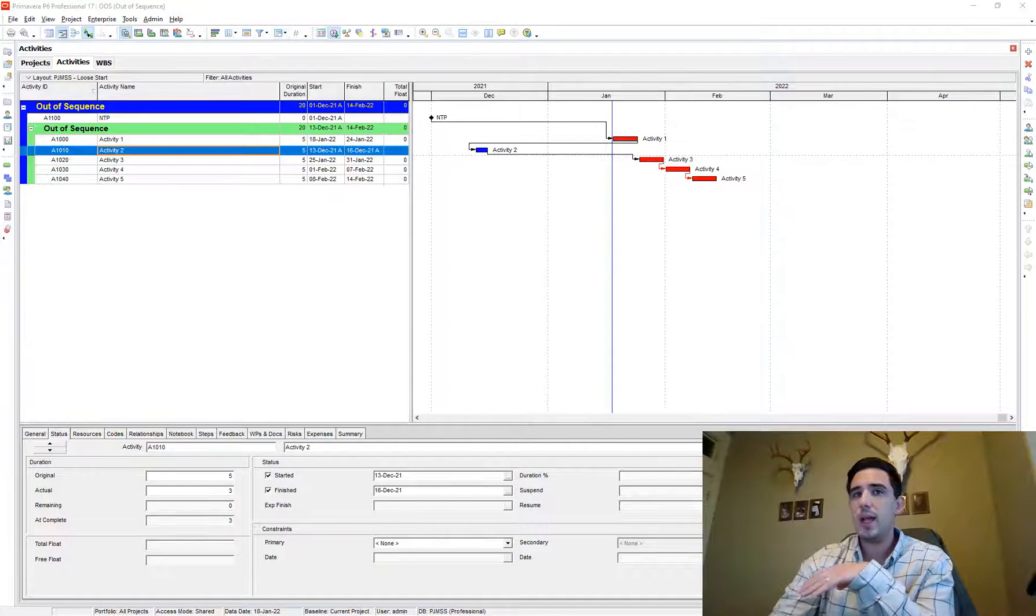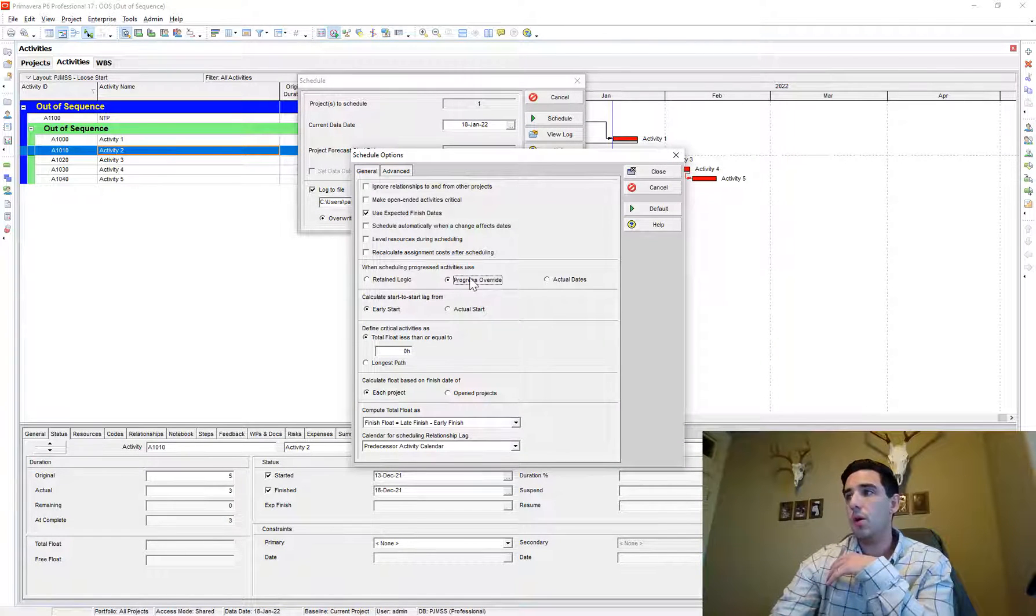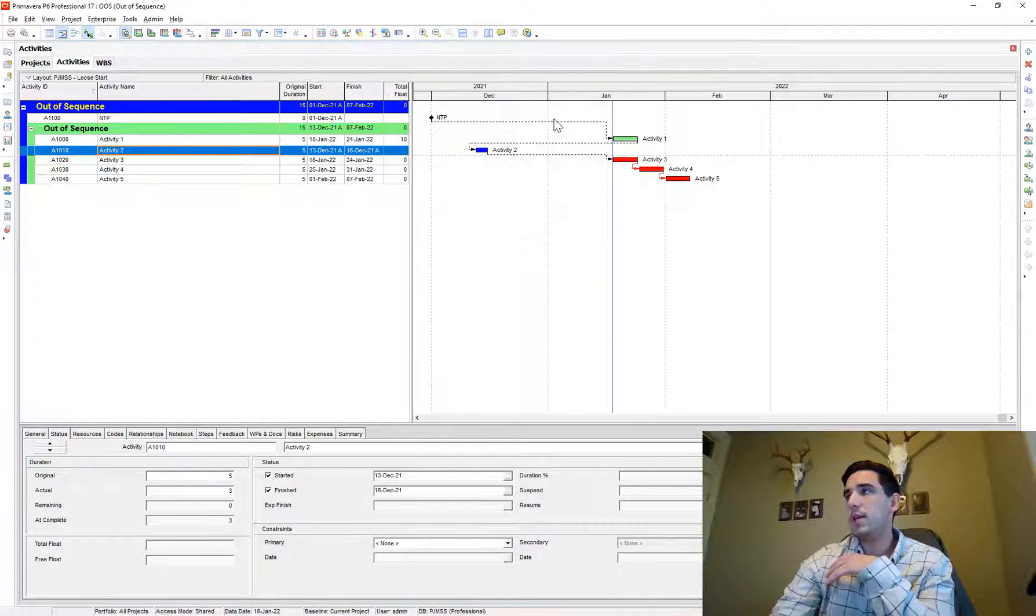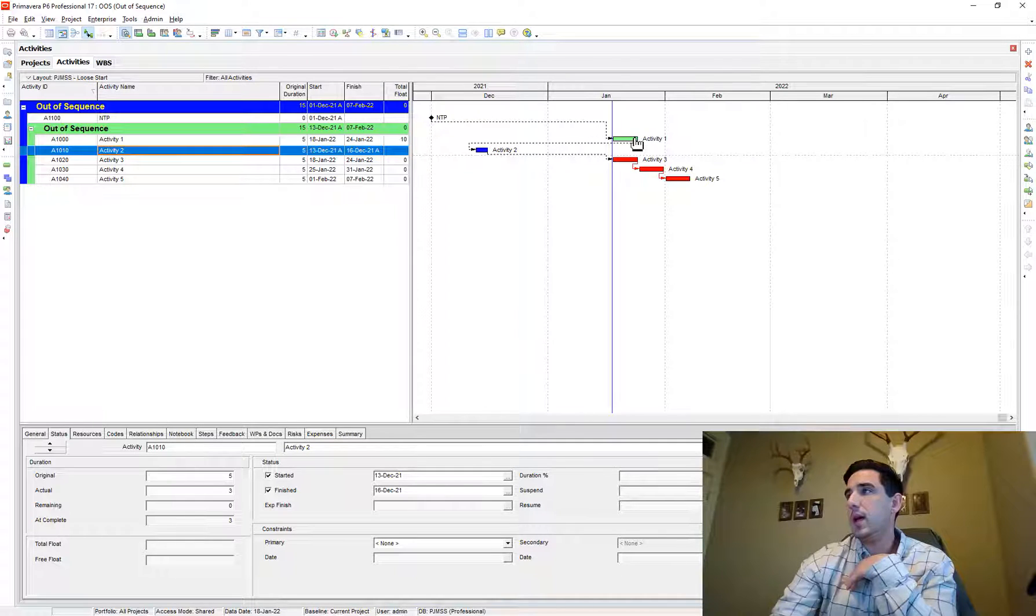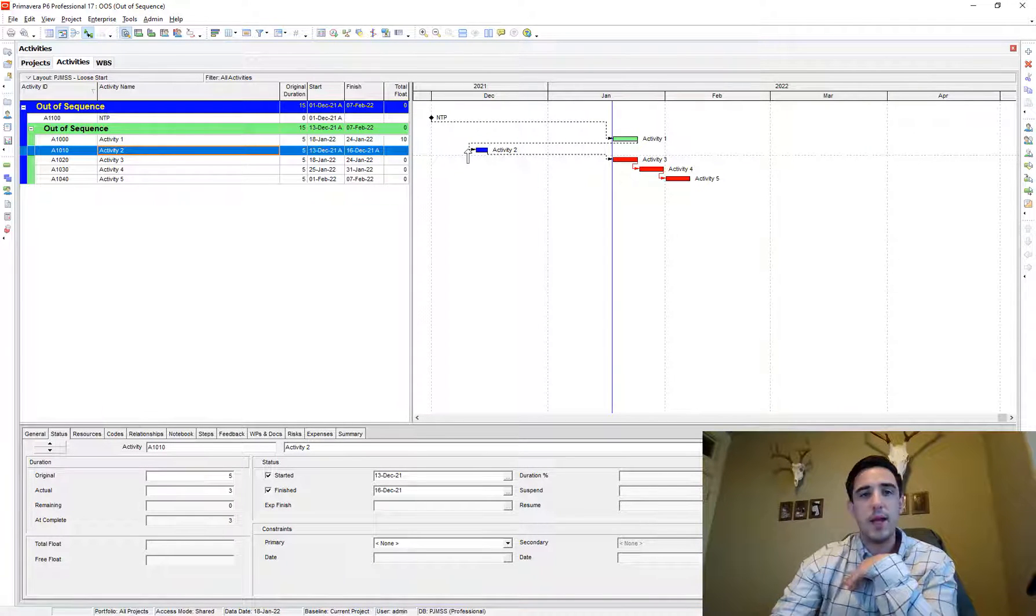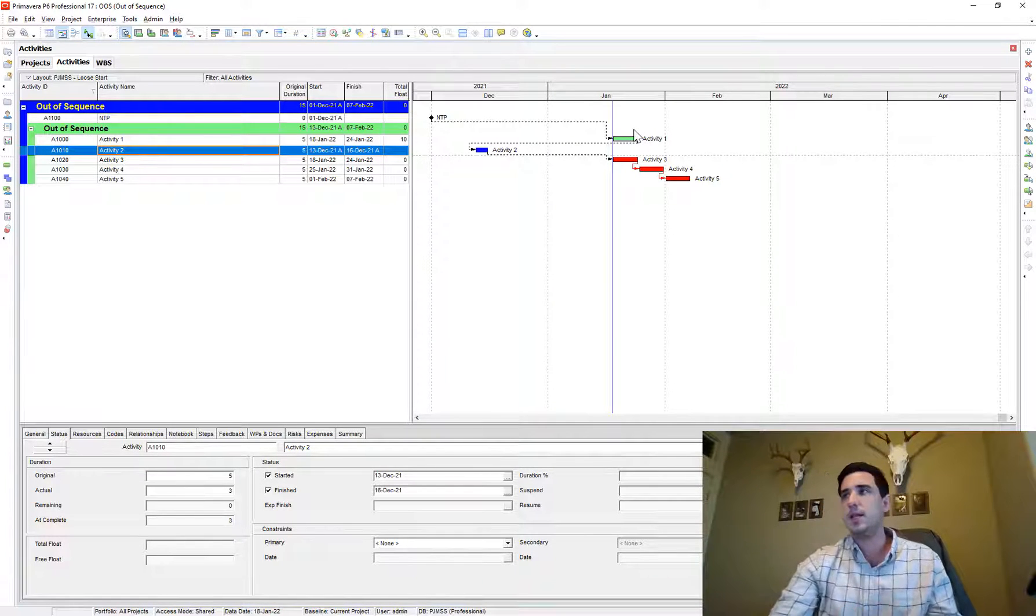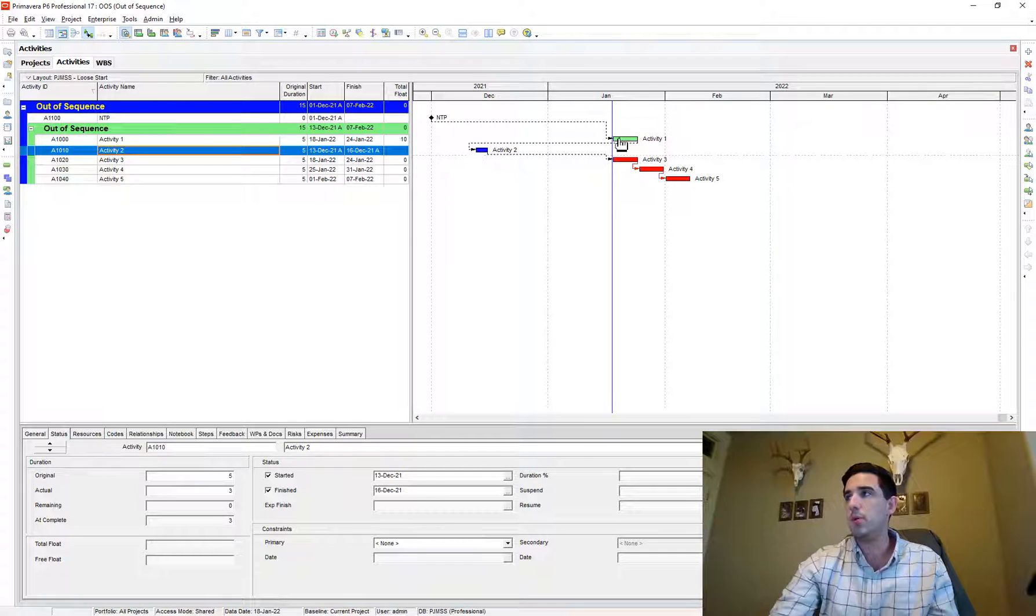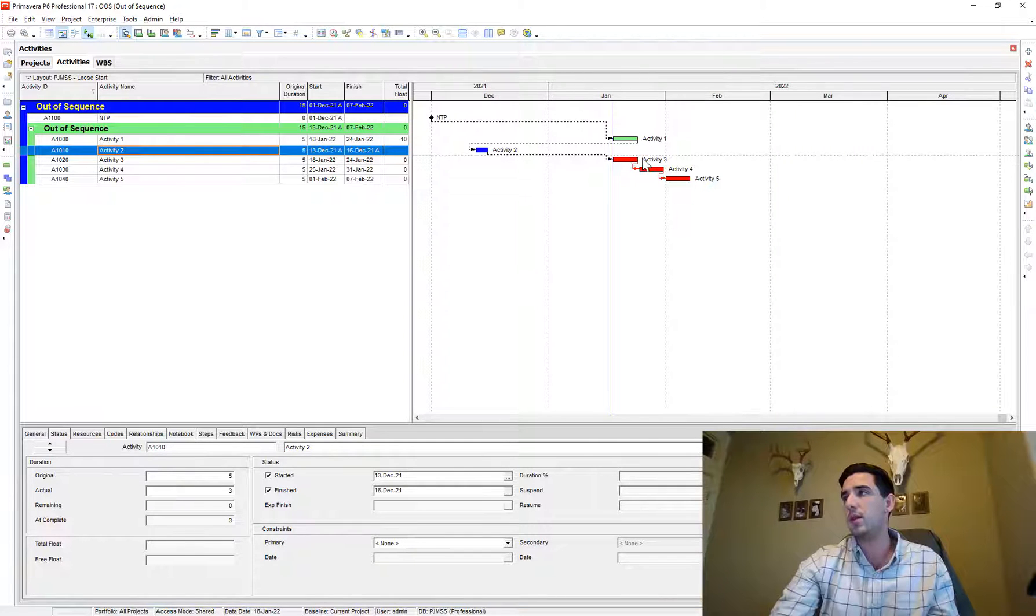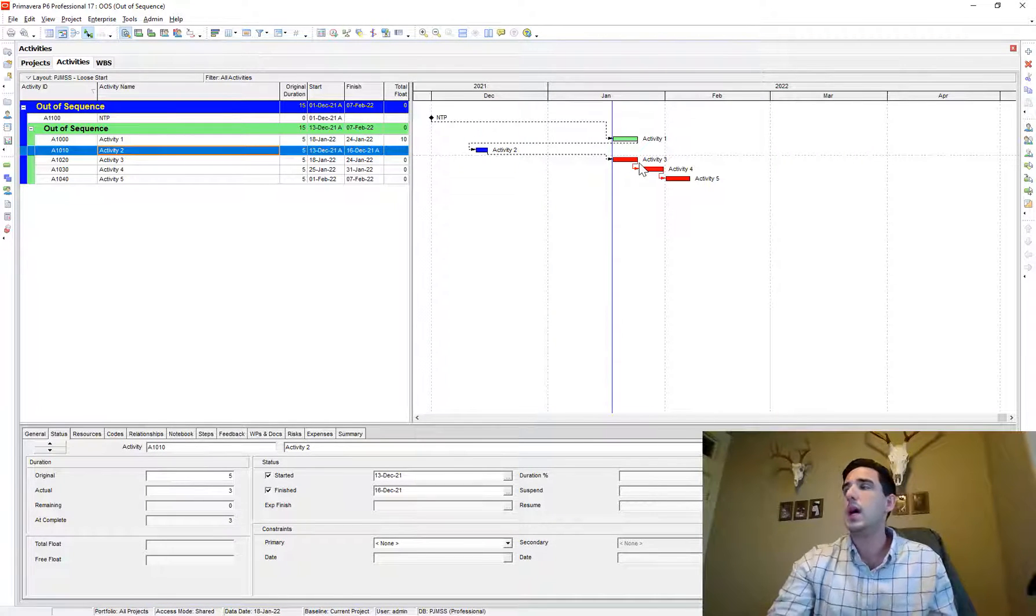On the other hand, if you have progress override and we schedule using that methodology, it's going to break the tie between activity one and two, it's no longer going to honor that relationship because according to the scheduling software, it doesn't make sense because you've started activity two prior to finishing activity one. So therefore that relationship doesn't get carried through to activity three and that relationship gets broken.